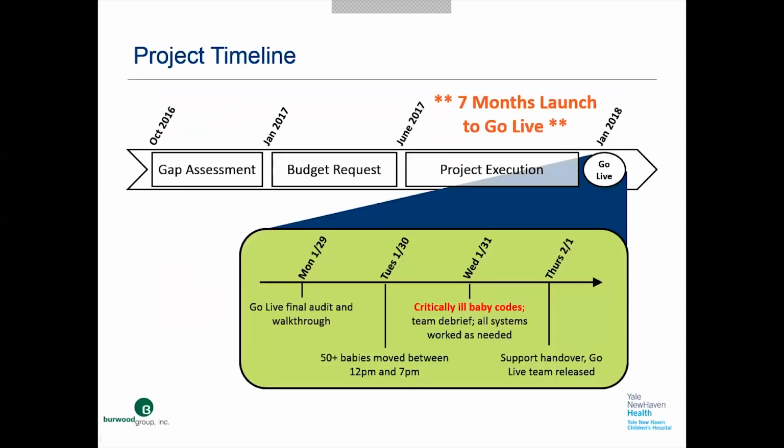When we look at the actual compressed project itself, when we implemented all of these technologies that Sam outlined in that connected care environment, it was actually a 7-month project, start to finish, with 5 months of that really being the design, implementation, testing, redesign, and training completed. The last 2 months of the project were really just allowed for activities leading up to the go-live date.